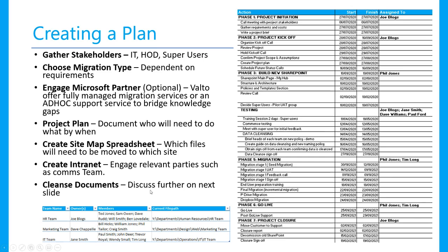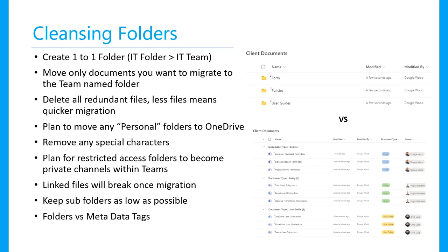Cleansing your documents, I'm going to discuss further on the next slide, but cleansing the documents is really important, and you really want to be starting that as soon as possible. From the point you've got your stakeholders together, you want to be trying to get people cleansing documents as soon as possible, because from a migration perspective, it's the cleansing of the documents which is going to take the most amount of time. So when you're cleansing your folders, what do you need to be thinking about?